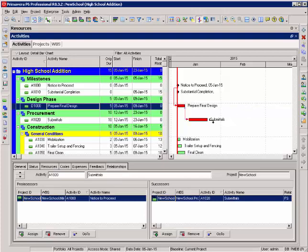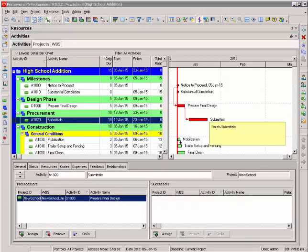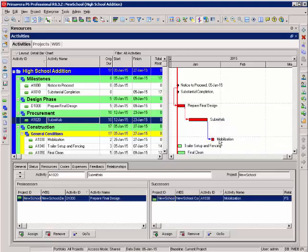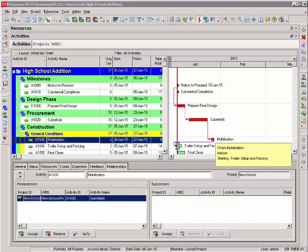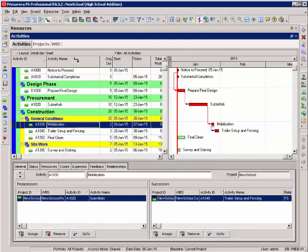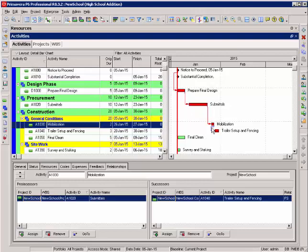Let's do just a couple more using our linking tool. I'm linking submittals to mobilization and mobilization to trailer setup and fencing. I have my activity set to sort by my activity ID column. That keeps my activity IDs in order as I'm adding my logic.